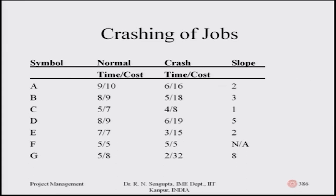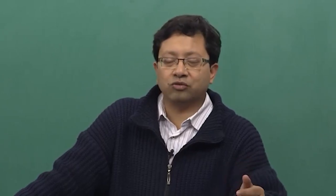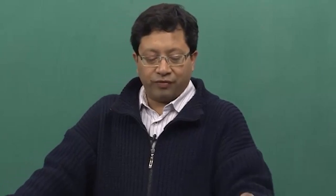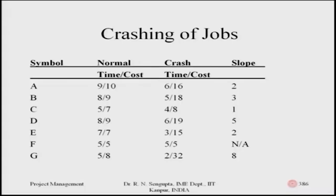For job A, the cost difference is sixteen minus ten, which is six, and the duration difference is nine minus six, which is three. So six divided by three gives a slope of two — meaning the marginal cost increase for one day's reduction for activity A is two units. For job B, it is eighteen minus nine, which is nine, divided by eight minus five, which is three — so nine divided by three is three.